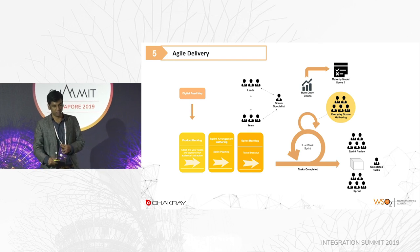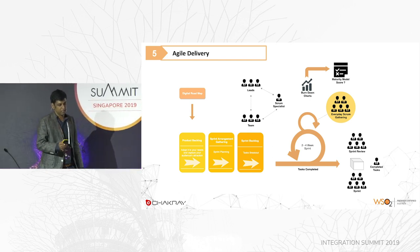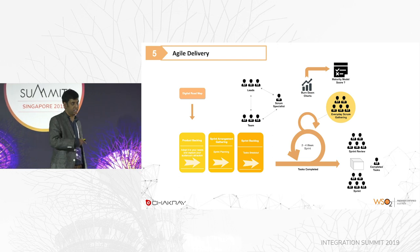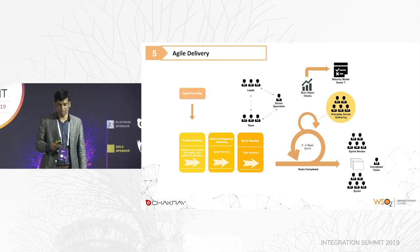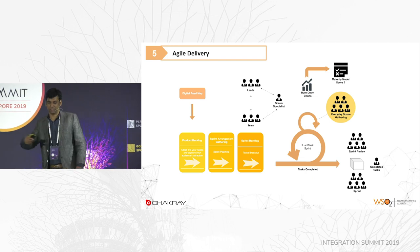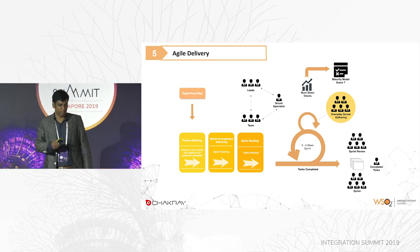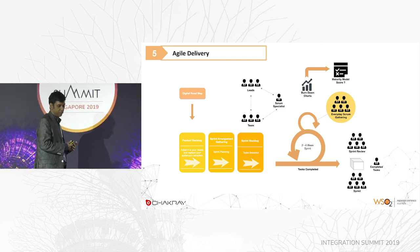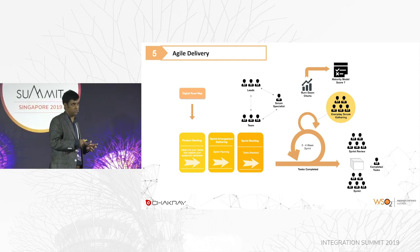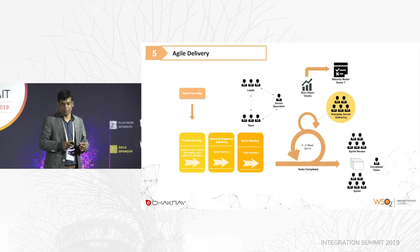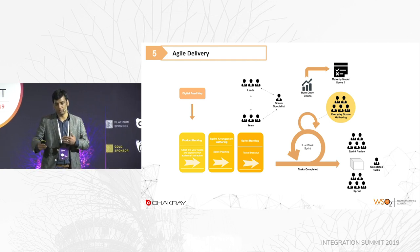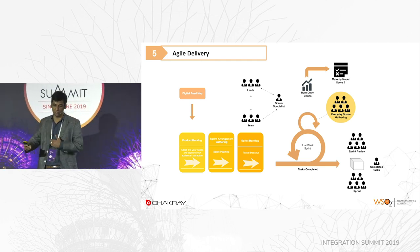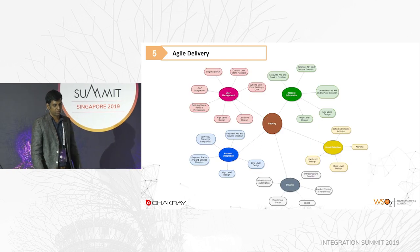With two-week sprints, once a sprint completes, there will be a sprint review, retrospective, show-and-tell, and demonstrations at the end of each sprint. A daily scrum standup also happens. For KPIs, we create reports including a burn-down chart and a maturity model score — a percentage showing how far you are from the final goal — for the CIO's benefit. That is agile delivery.